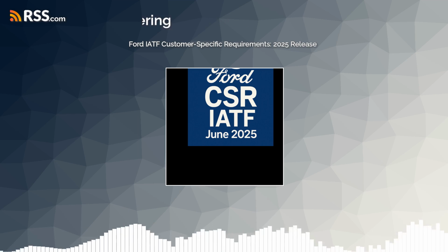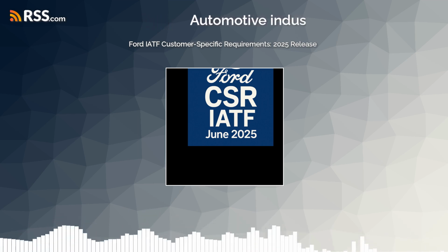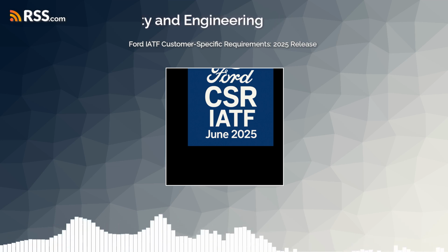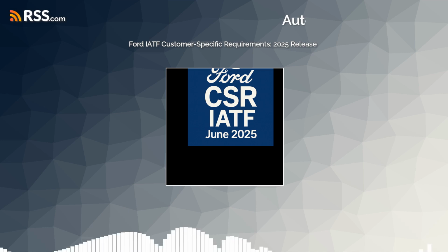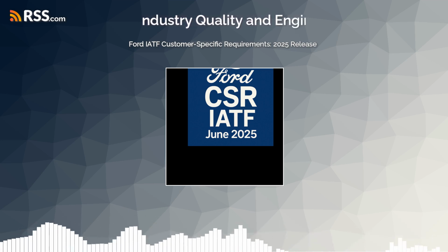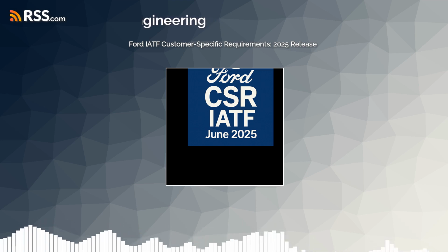Exit criteria, like what? This often includes achieving a minimum period, typically 4 weeks, of clean production without quality claims, a formal data review with Ford STA, and verification that any permanent corrective actions for launch issues have been implemented effectively. If issues occur during the safe launch period, the duration of these extraordinary controls is extended. You don't get off easy if things go wrong, and data from all phases of the launch must be available for review by Ford.